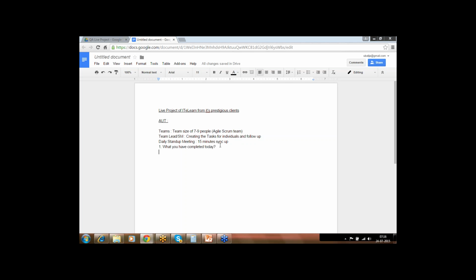completed today. If you are meeting at the end of the day, you should talk about what you have completed today, from the tasks that were allocated, and what is planned for you for the next day. If you are meeting at the beginning of the day, you can convert these questions into what you have completed yesterday and what you are planning to do today.